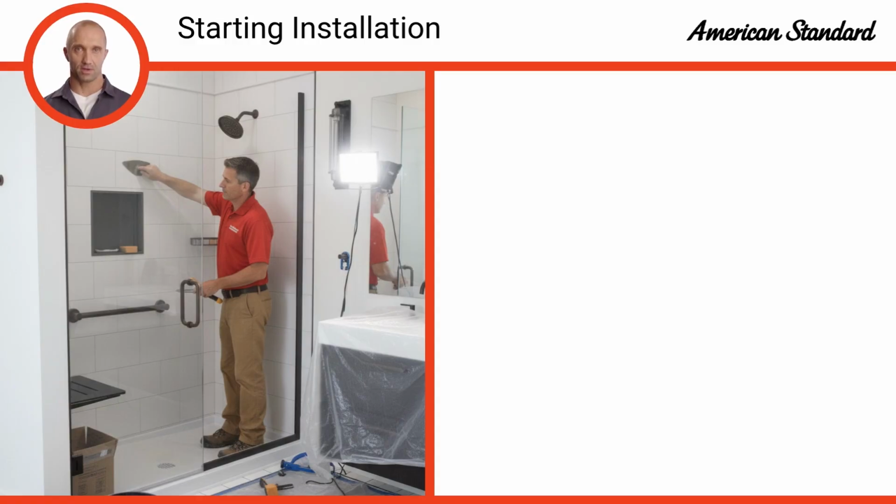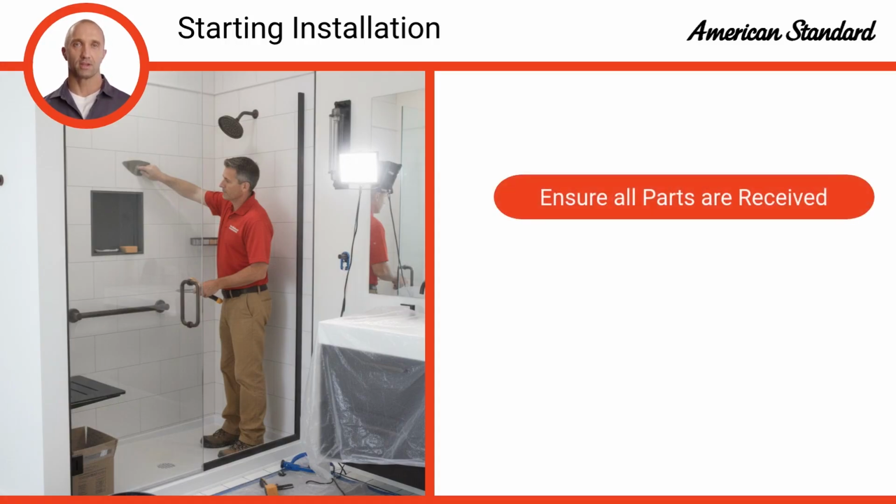On the scheduled installation date, the general contractor must arrive at the installation site at the agreed time and begin the installation. As a first step, ensure that all necessary parts have been received. This prevents delays if parts are needed later on and were not originally provided.